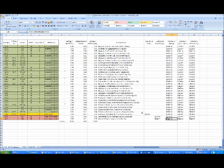So I think what we learned is that when we head down this path and we've got this kind of really high visibility critical project that we're managing between two contracts, our directions to our contractors now are to update these schedules weekly. In part one, we talked about how we expose Contract Manager and P6 Web through the web portal of the city, and the contractors get into our computer system through that web portal, and they do all their own work. They input their own daily reports, and they update their P6 schedules themselves. They own them and update them. We just helped them with this mass rescheduling and handed it off to them, and they own them now. So they're coming in weekly, updating the P6 schedules.